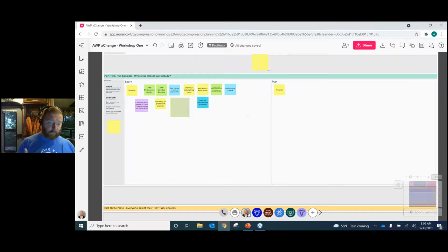So speaking specifically to the CII one, you enter 5 pieces of data. You tell us the size of your project, and I'm trying to do this backwards because you're seeing me in reverse. So you do the size of the project, the duration of the construction phase, the duration of the overall FEL2 to mechanical completion and startup. You do your organizational maturity and which category of AWP you do. You tell us those 5 things and we give you an answer.